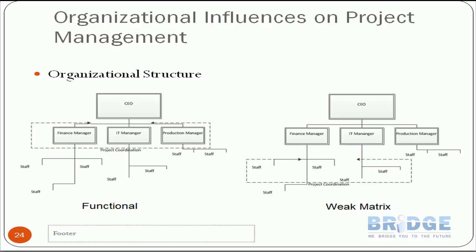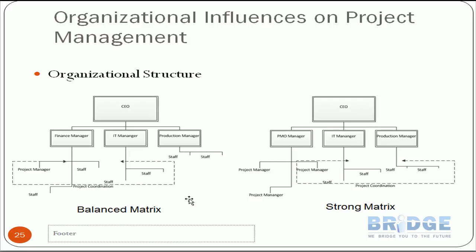Let's move on to the balanced matrix, a better structure. Here we pick an experienced person from a department, officially assign them as project manager, and ask them to work full-time on the project until it ends — after which they return to their daily operations. This gives us a dedicated project manager with a clear line of responsibility and some authority to make proper decisions.